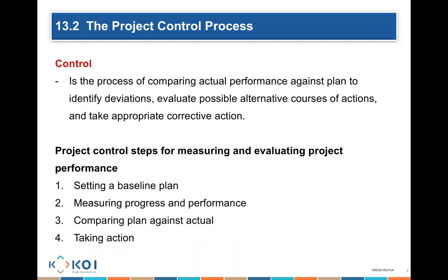We need to have a control. So you plan to finish a large part of the work within a certain period of time. How do you know you've actually achieved what you were planning to achieve? So you need to really have a control. What is the control? The control is about performance comparison. I need to compare my actual performance against my planned performance and check for deviation.